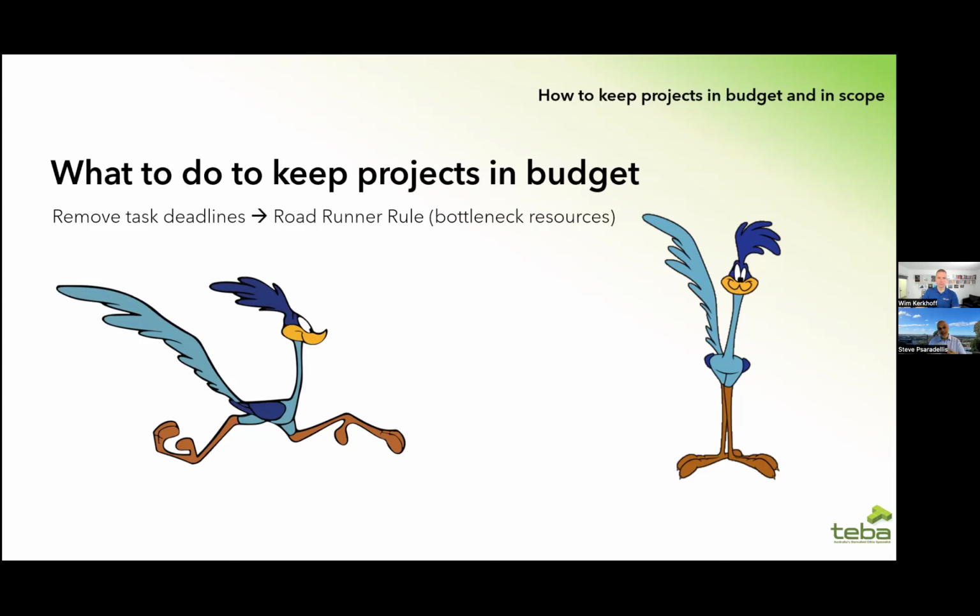And the tickets are generally break fix or a request that shouldn't take much time. And instead of coming back to the project and continuing when it was ready, they go and spend all this time on other tickets that somebody else could have been doing. So what happens? That whole project gets delayed simply because we think that utilization being high for everybody is a must.